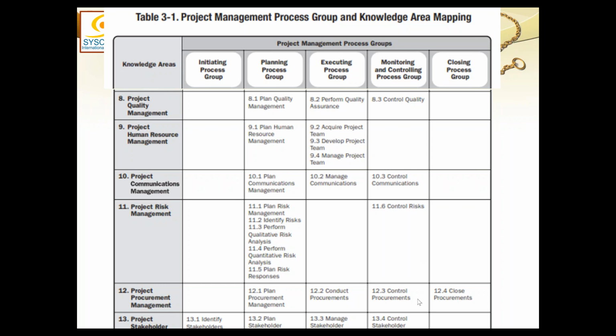Rest everything has control. Communication has to be controlled. How much communication had to be done, how much communication has been done, how much less was done, and why. What is the impact on the project? If there is a change required, then a change request is moved.